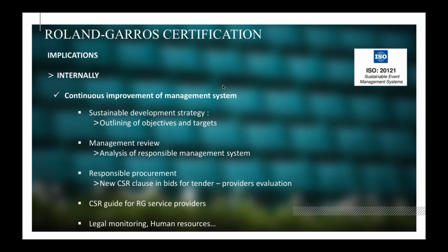The certification helped us with responsible procurement. It's perhaps the most important thing we got from the certification. Now, in all our bids for tenders, we have CSR sustainable clauses, and we evaluate our providers. It was demanded by the certifier, and perhaps the most important for us. Today we can say that 86% of our procurement has sustainable clauses and evaluations.